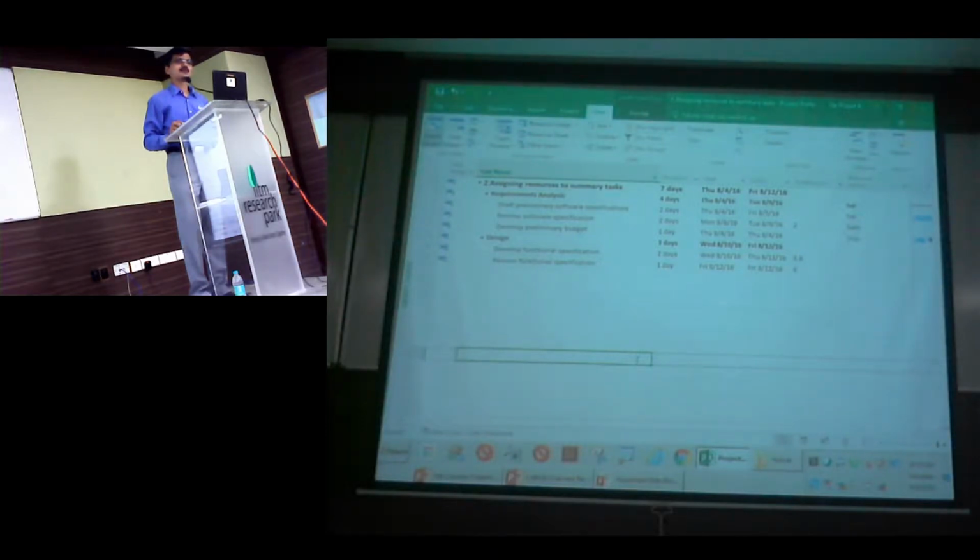There will be a conflict between the summary responsibility and the task responsibility. But that is accountability, it's not specified. Right? Correct. The point here is, though in your words it is accountable, Project does not know it. Project assumes that Sai is going to work from this day to this day for 4 days. And what you notice is during that 4 days time, he is also working on another task, which is one of its sub activities.